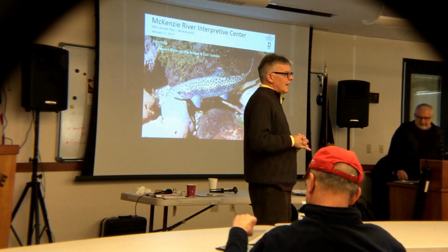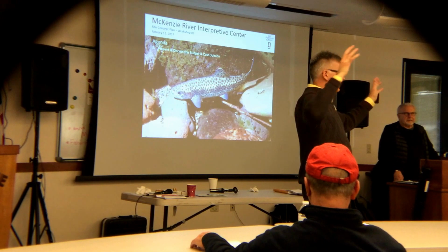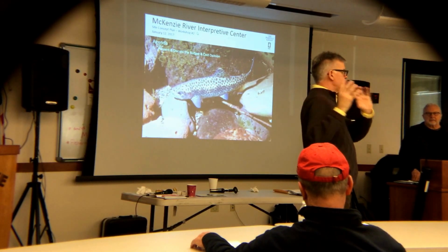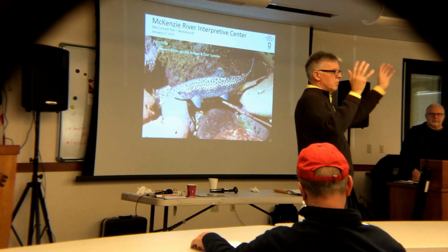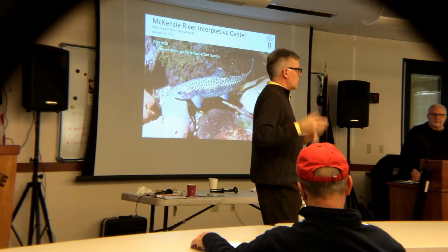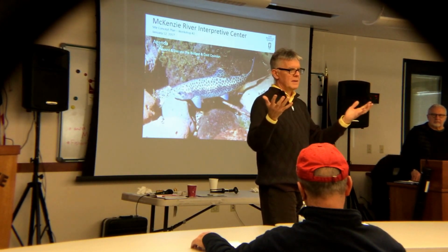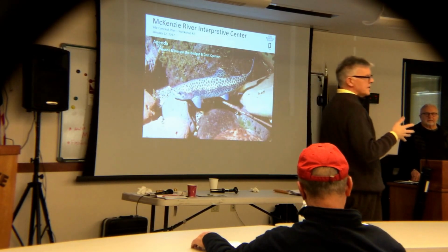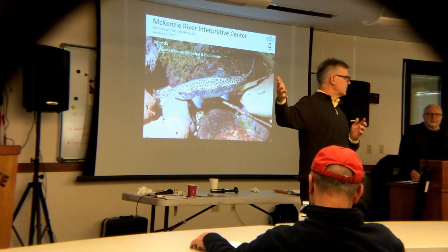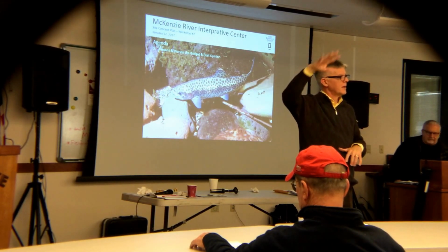They will be there. The other thing we looked at when we looked at your preliminary budgets is that there are 3 basic components of the construction cost. When Jan did her look at that, her primary input was on the exhibit cost, and that was a multi-million-dollar figure. There is the bucket for the building cost, and even at this stage, we know for a museum interpretive center that we need to be in the $400 a square foot value to build that building. But there's also site cost, primarily related to earthwork, planting, and restoration to build a parking lot, to do a building pad. And then there are lesser costs, but important, to build interpretive trails and pieces.